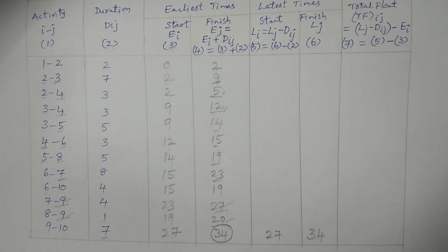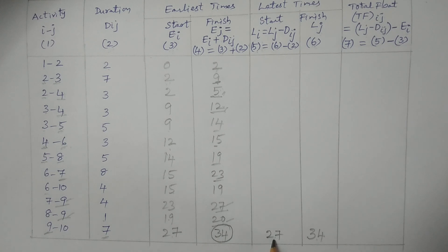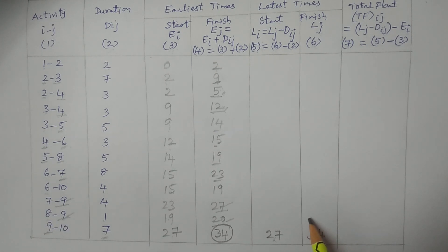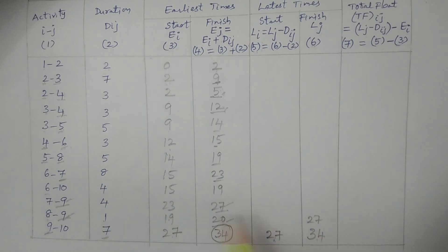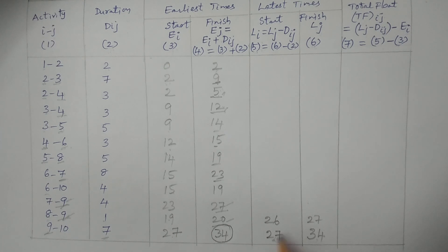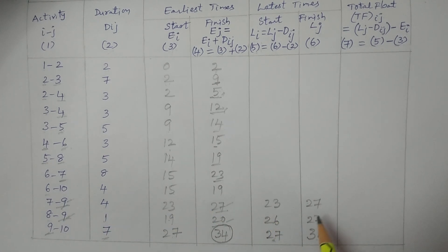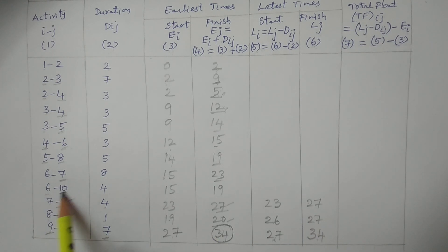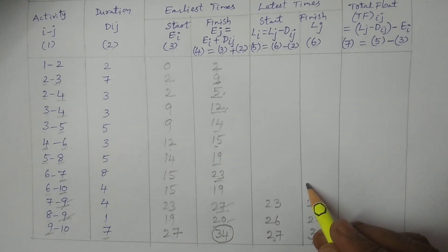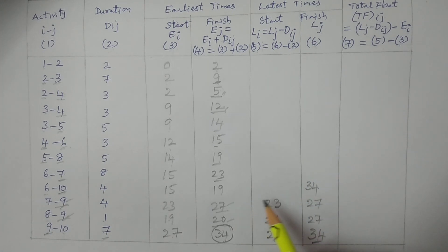For 7 to 9: L9 is 27. 27 minus 4 equals 23. For 6 to 10: L10 is 34. 34 minus 4 equals 30. For 6 to 7: only one value, L7 is 23. 23 minus 8 equals 15. For 5 to 8: L8 is 26, only one value. 26 minus 5 equals 21.